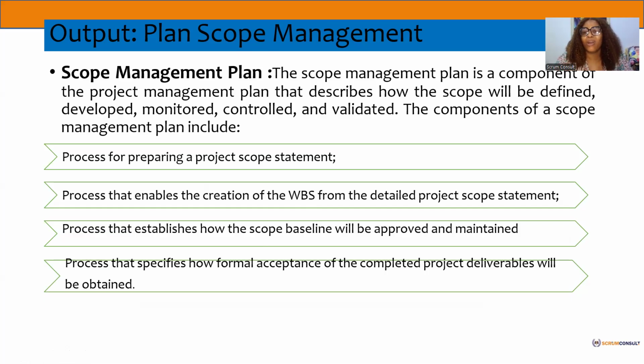For example, we have to send in the scope baseline for approval at least 2 weeks before the time that we are expecting, because of our stakeholders, the organizational culture and values, and standards. We need to work ahead. We have it in the plan. So you see, for us, being able to manage scope well is our ability to conform to the things that we have stated that we are going to do when it comes to scope management. That is quality. That is performance in traditional project management.